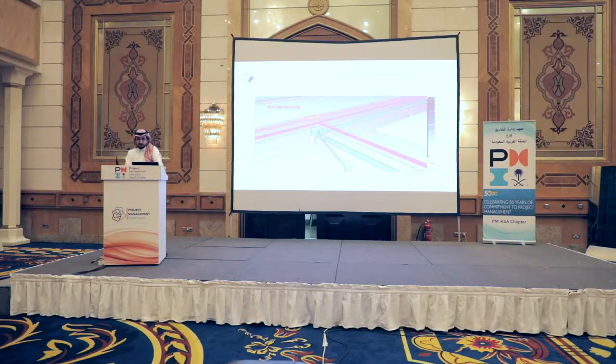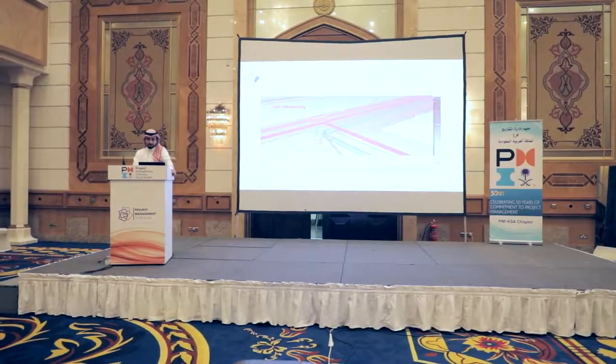This is the same area after resolving the clashes. And this second screenshot shows the clash report after engaging BIM for construction to resolve the design clashes. The report shows a total number of 23 clashes identified for medium voltage cables with irrigation lines, where 3 are approved, which means not clashing, and 95 are resolved, finding alternative routes.